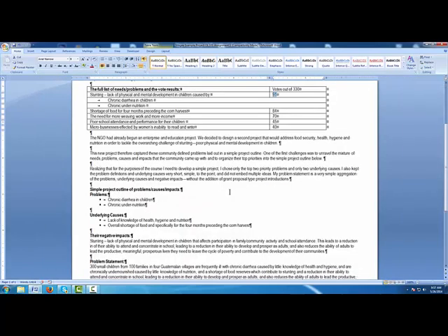From your newly revised chart, pick the 2 most human-oriented, compelling problems. Keep them short and focused on one concept. Simply copy them from the vote results and paste them into the problem section of the outline. We want to keep these problems short. They're really just a bullet point at this stage of the game.